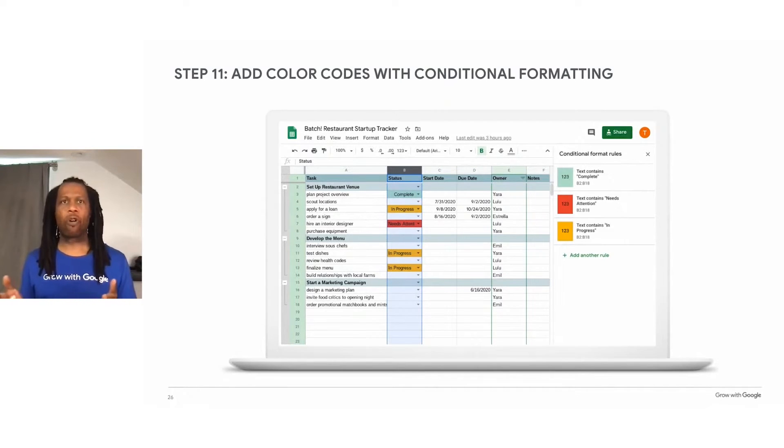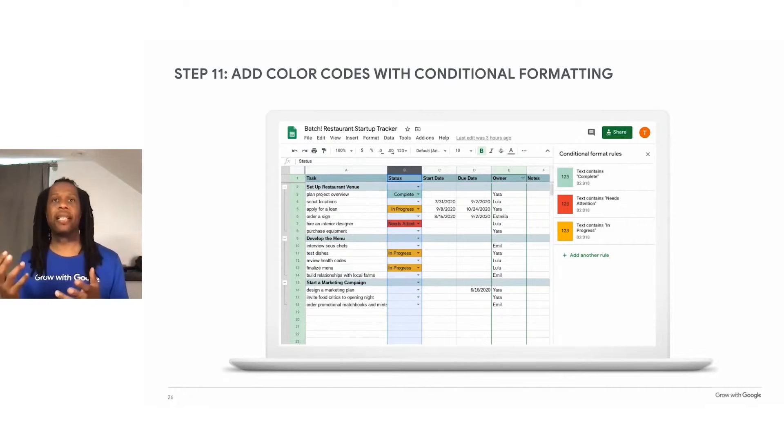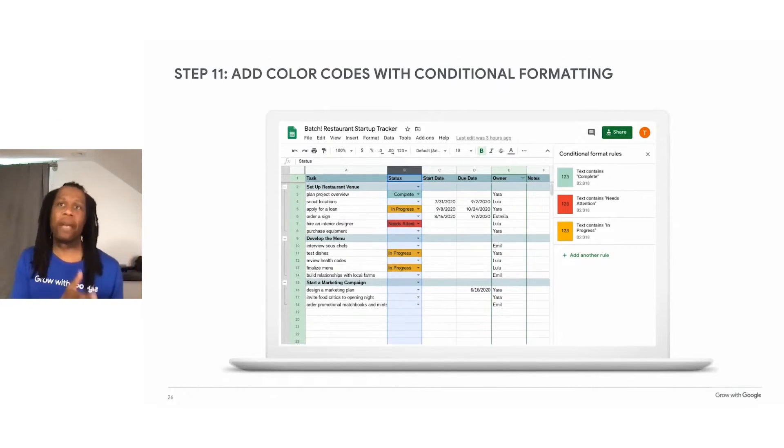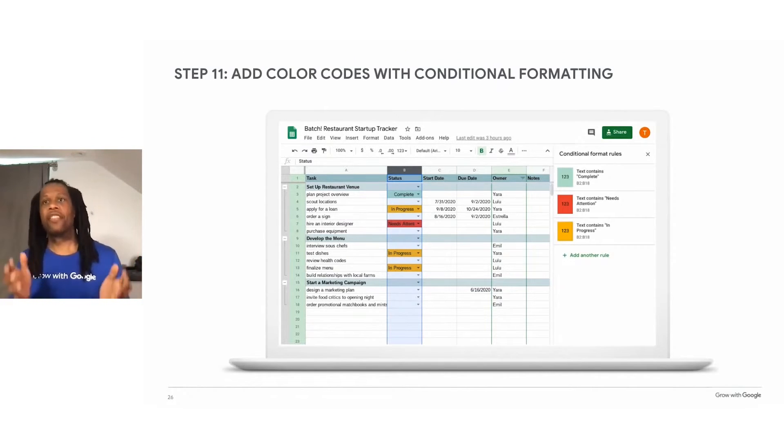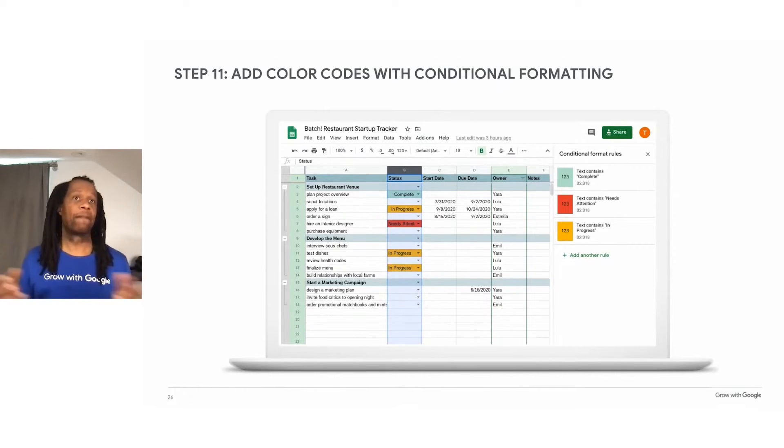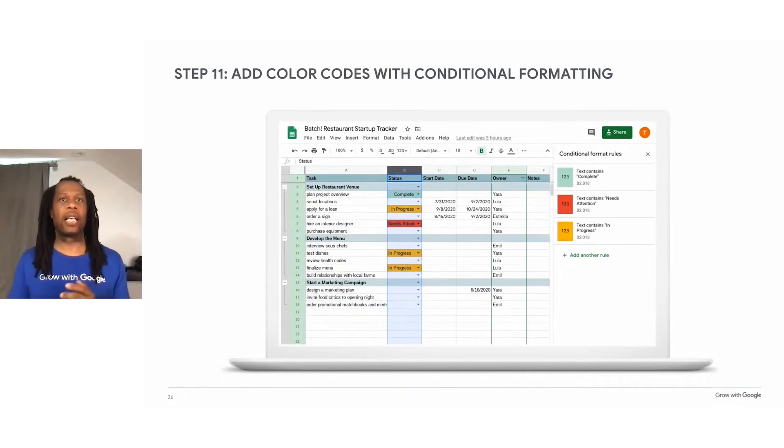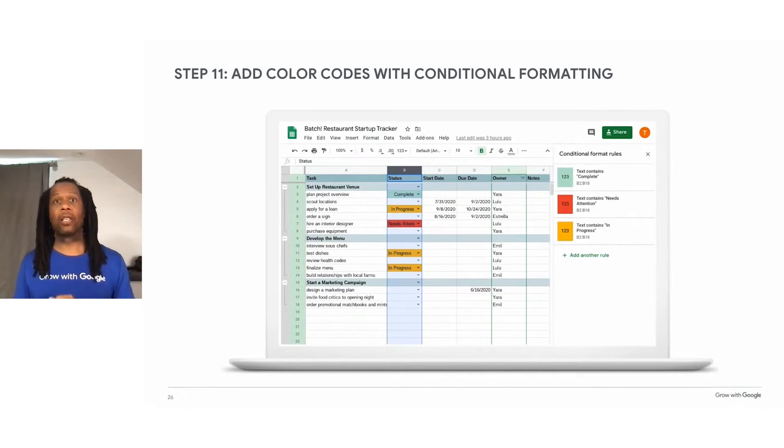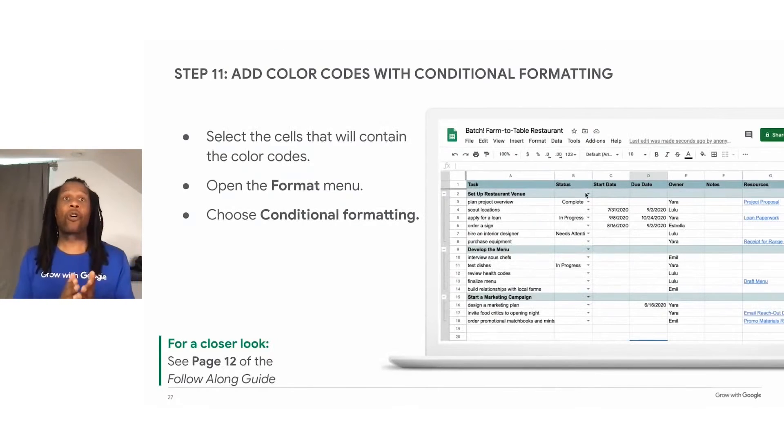Conditional formatting changes the color or font formatting in a cell if the contents of that cell matches a particular criteria. You can think of conditional formatting like an if-then sentence. So if the cell contains certain information, then the spreadsheet will change the formatting of the cell. For this example, let's say if the task is complete, change the fill color to green.